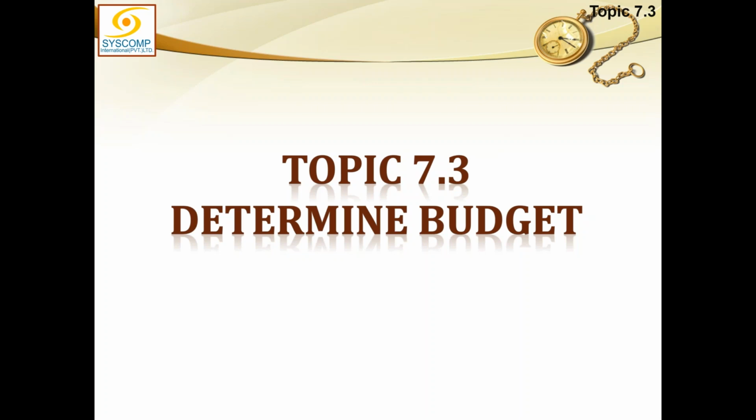So, what was the limit? There was the variance of minus 10 plus 25%. So, they are expecting the project manager's estimate to be around 100,000. This makes sense, because our estimate is 100,000, so the project manager should be coming up with something around it.